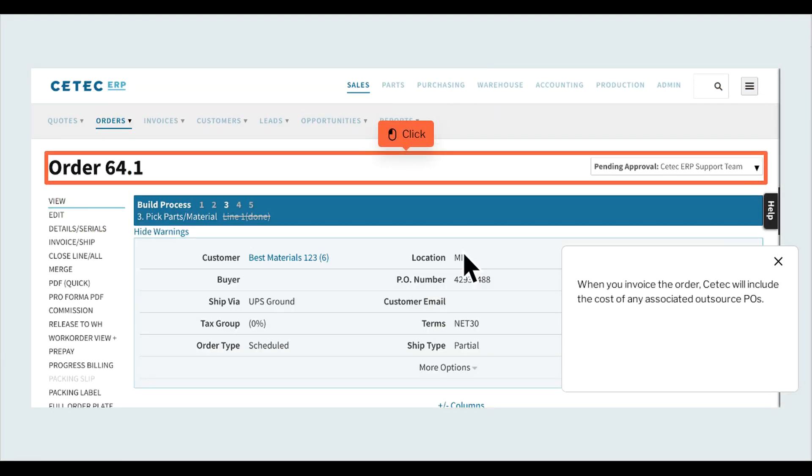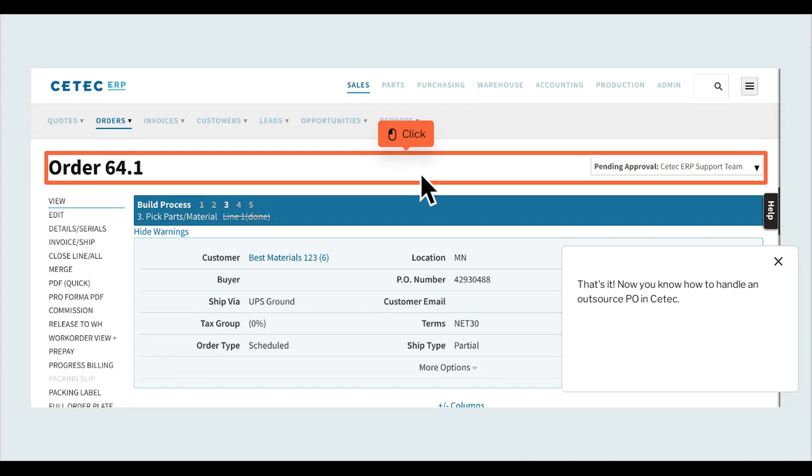When you invoice the order, CTEC will include the cost of any associated Outsource POs. That's it. Now you know how to handle an Outsource PO in CTEC.